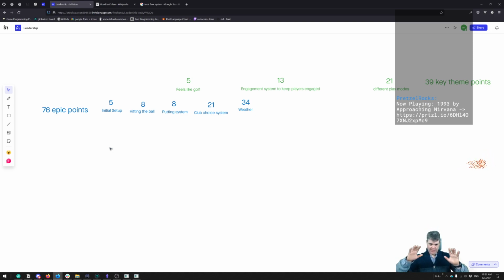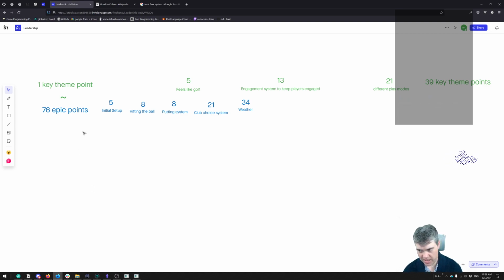So this blew my mind, and I did not believe this was going to be true at all. But one key theme point is roughly equal to 76 epic points. Okay, got that. Now let's take one of these epics and create user stories for that one epic.